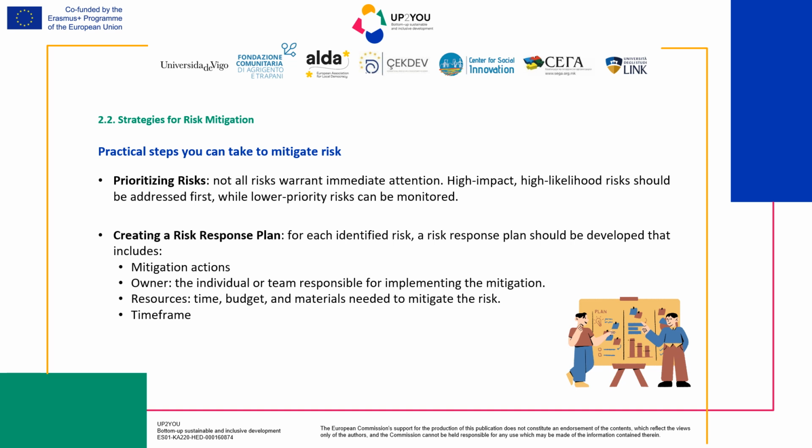Resources. What resources, time, budget, personnel, materials will be needed to mitigate the risk? Ensure that the resources are allocated and available before the risk occurs to avoid delays. Time frame. When will the mitigation action be completed? Setting clear deadlines for each action ensures that the response plan is timely and that any delays or issues can be addressed immediately. And of course, the mitigation action you will develop.